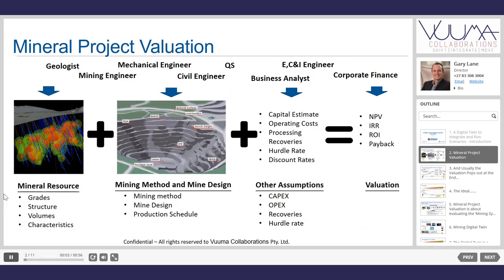Mineral Project Valuation is generally a process where you assemble a whole bunch of engineers into a project team — mining engineers, mechanical engineers, civil. There's a QS to do the capital estimate and a business analyst to do the financial model, plus corporate finance. It's a combination of putting the resource model valuation together with the mine design and mining method, which is iterative since the mineral resource determines the mining method. The business analyst then builds a financial model using the capital estimate, operating costs, and recoveries to produce an NPV, IRR, return on investment, or payback.